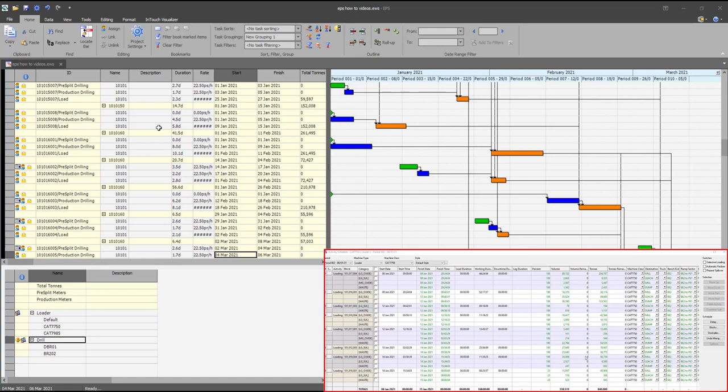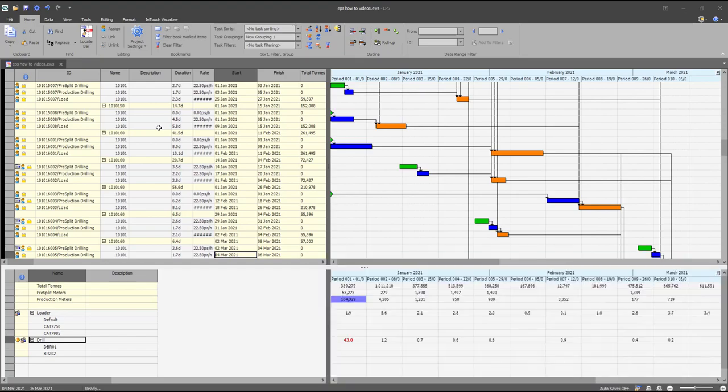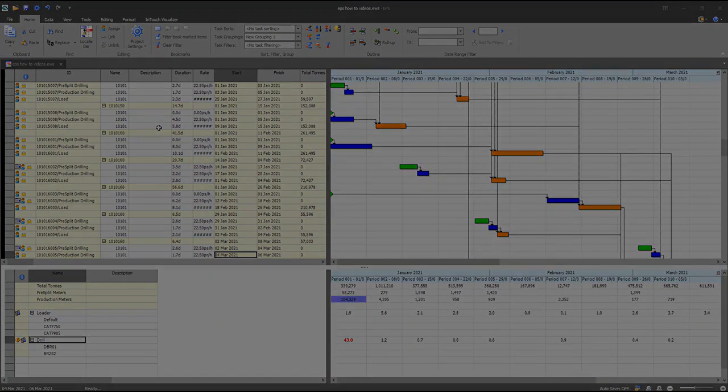Any remaining portion of a task that has not been scheduled in Studio OP will be moved to the last period of the reporting calendar.